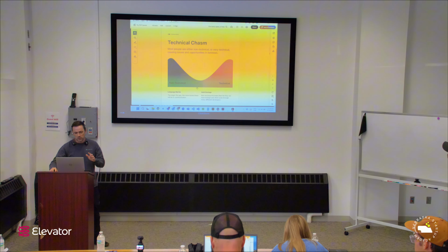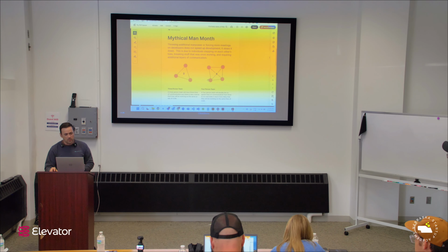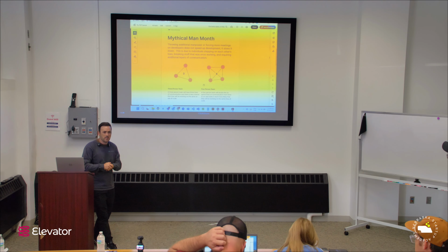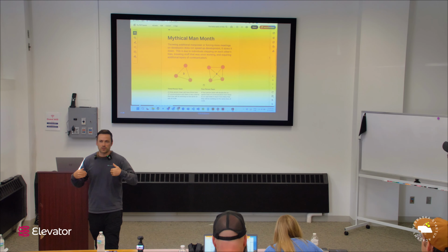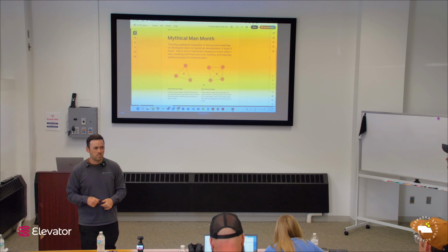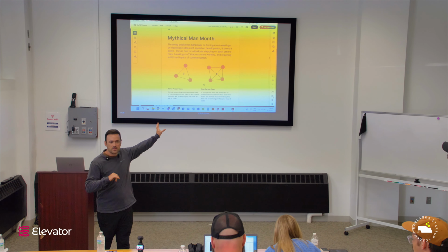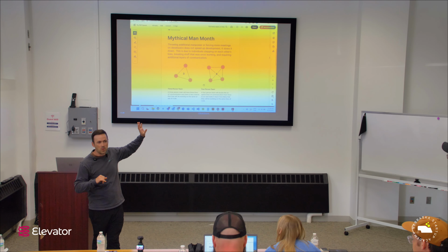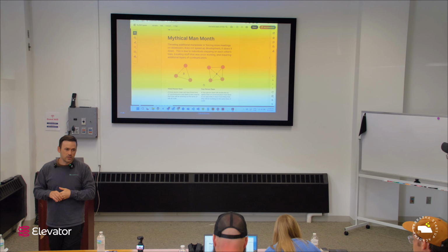So that's another one, and we'll address ways to fix this as well. The third one we always like to talk about is the mythical man month. One of the biggest problems with software is you can't just throw resources at software and expect it to go faster. A simple illustration is that the more people involved in the software, the more layers of communication you have.